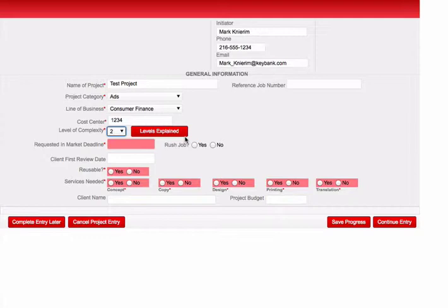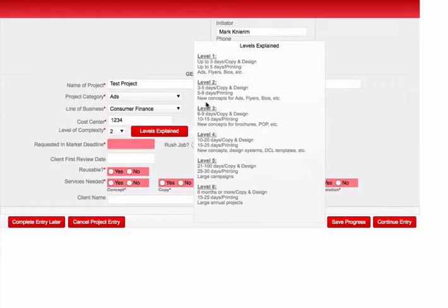But in this case, for this example that we did, it was for a bank, and so they had some stringent compliance requirements. So I mentioned the levels that were on that screen, and so what levels are, this is flexible, but this gives you an idea of kind of what a level can be. And again, automatically, depending on the level type and the type of project, certain milestones will get assigned. So if it's, for example, a level 4, we'll automatically assign a certain number of